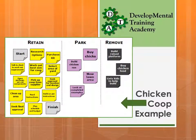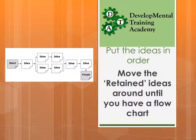Looking at our chicken coop example, we've got a range of ideas in yellow to retain, a number that we're going to park till later such as buy some chicks and mow the lawn, and a number that we've decided to remove such as getting the kids to help build the chicken coop. From there you put the ideas into some sort of order, much like a flowchart — take all the ideas in the retain column and move them around until you have a flowchart.